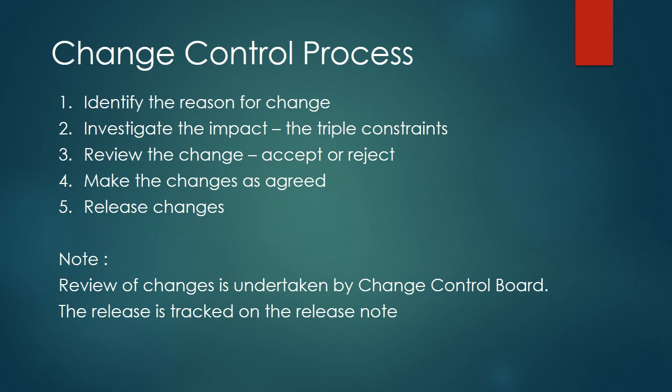Thereafter, each change request passes through what we call the integrated change control. Here the impact of each request is analyzed on 8 project management knowledge areas regardless of which change control system it originates from. So either it came as only a cost change control or only a scope change control, we are still going to analyze whether it is going to impact all of these areas. To be precise, it is said that only the triple constraints are checked, but the quality is also checked because some changes will happen to the quality also. Some additional risk might be there. Analysis has to be done overall, but the critical ones are the triple constraints. That's why we have written it like this.